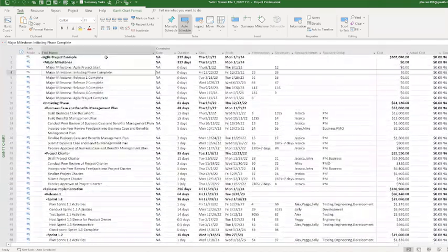So baselining is so much fun when you get into the real world because some people think you should just baseline the entire schedule and that's it. And that's how it is. Or you be agile and not really baseline anything, which doesn't make sense because you got to have some way of measurement, right? So you could baseline in increments, which in project management terms we call progressive elaboration, which is meaning you just plan out little chunks over time.